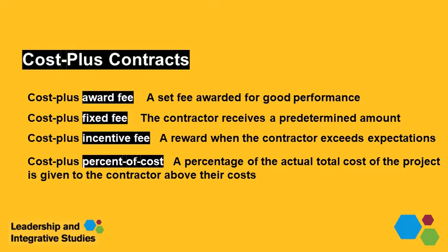In an award fee arrangement, there are conditions specified in the contract that define the rate that the award will be. Alternatively, the fixed fee arrangement provides an established amount as the fee regardless of what the costs actually are at the end of the contract.